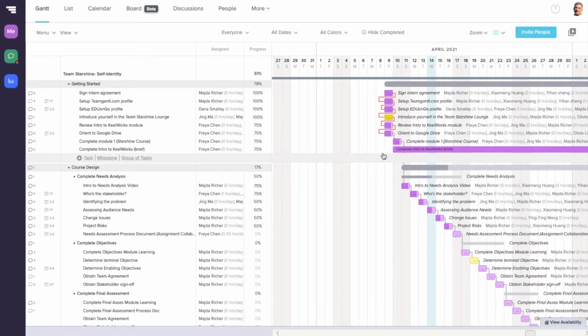Now also you might notice, if you're looking closely, that this task doesn't have any dependency. That's because I don't want you to stop moving forward until you've done all the tutorials. It's not necessary to do all the tutorials in order to do your other tasks.